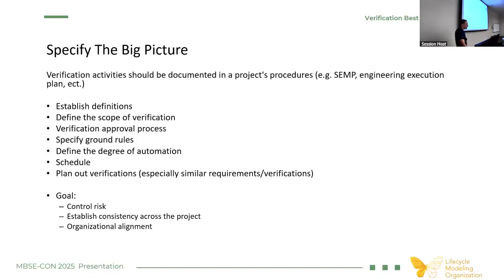So what we've done is we've spread out the verification activities over major milestones. We use about 3 different major milestones: one after the design is complete, one that is coming up for us in a couple of months when the major construction activities are complete, and then finally, that final turnover just before we hand over the hardware to the customer. By breaking up into those chunks, we incrementally buy down that risk, and we basically pin the rose on whoever's providing that verification evidence at the time when they can affect it most readily.